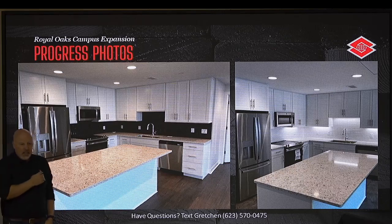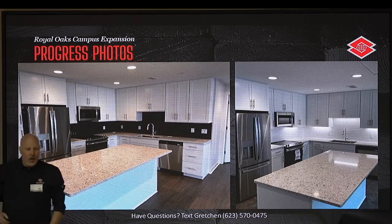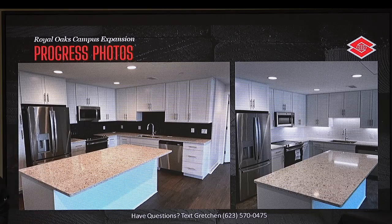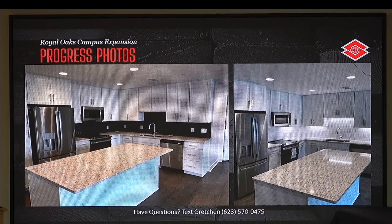You'll see on the inside, basically at this building, all of these units are signed off, corridors are signed off, elevator is signed off, fire sprinkler is signed off, fire alarm is signed off. We've been through virtually everything. Right now we have a set of doors that is not signed off. And that is a failing. It's all because of a little computer chip like this.